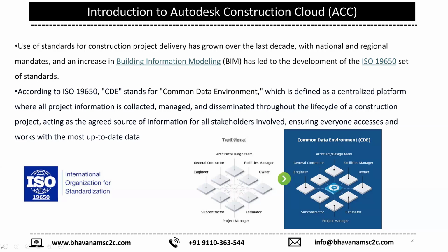But the teams are so disconnected. At times, the design team has released a new version of the document, but the site team is unaware and is working on the older version of the document. So it results in rework, and a lot of time was wasted. That is why the common data environment came into the picture: there should be a centralized environment where all the project data will be stored. I hope this much is clear.